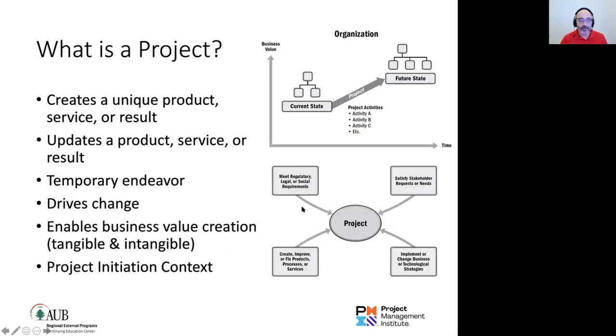Also, the definition of a project in the context of initiation. There is no project that is created except from a regulatory or legal or social requirement, or to satisfy a stakeholder request or a stakeholder need, or to implement a change, a technological change or a strategy. Like when we went with the alternative delivery channels and said we want to reduce cost on the branches, on walk-in customers, because they have a cost, let's create the alternative online delivery channels to indirectly reduce cost on the branches.